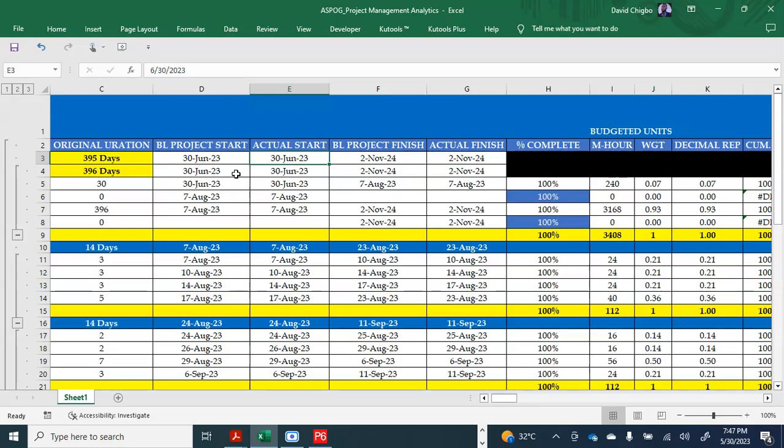If you are the owner of the project and you give the go-ahead to start, that's fine. But if your client does not give you the go-ahead to start, you cannot go and start the project. So your client needs to give you the go-ahead. That's when you start. So contract is contract. It is good to follow the contract document.